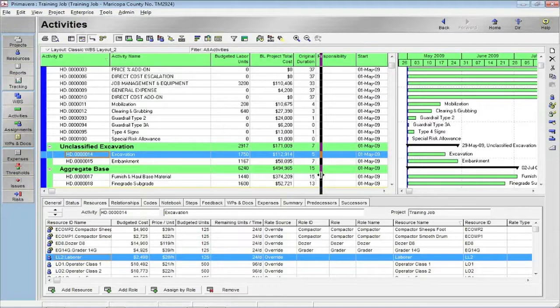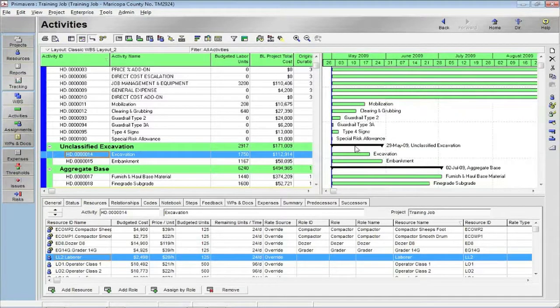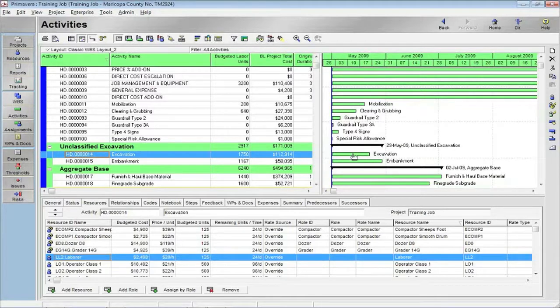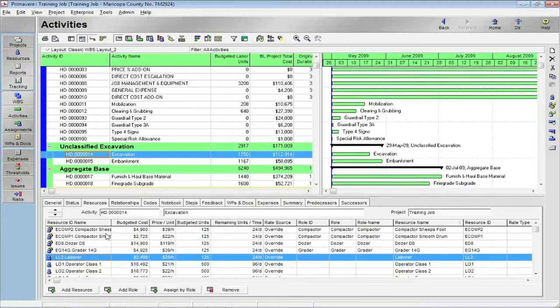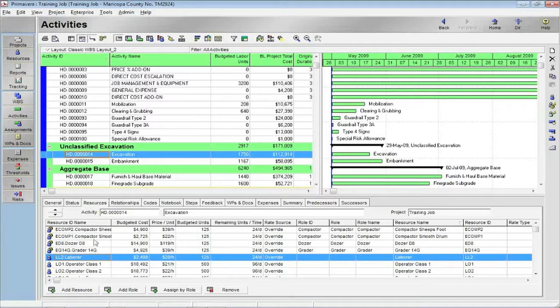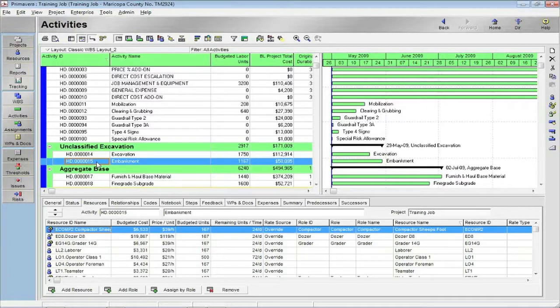I got some additional columns here for the labor hours and the costs and start dates and so forth. Of course, if I were using this in the real process, once I have my activities in Primavera, then I, of course, make my logic links to create my schedule. I send out the resources, so here's some equipment and labor that were sent out, their costs, their price per unit, the hours, and so forth.